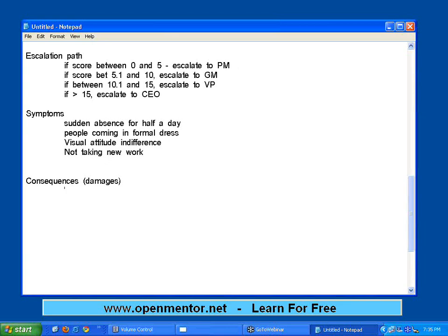Rework itself will delay the project by 1 week. Someone has to tell that number. If I'm going to do extra work for a week, who is going to pay? Is it the client or my management? If my management absorbs the cost, it is my loss. If the client is paying, it is fine. But you need to manage the relationship.